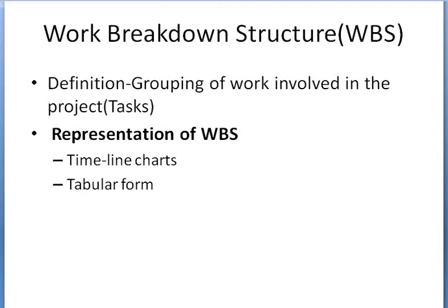In general, project scheduling tools require the specification of a work breakdown structure of different tasks. It is also called generation of the task network. Once the task breakdown structure or task network is defined, start and end dates, human resources, hard deadlines, and other data are attached to each task.